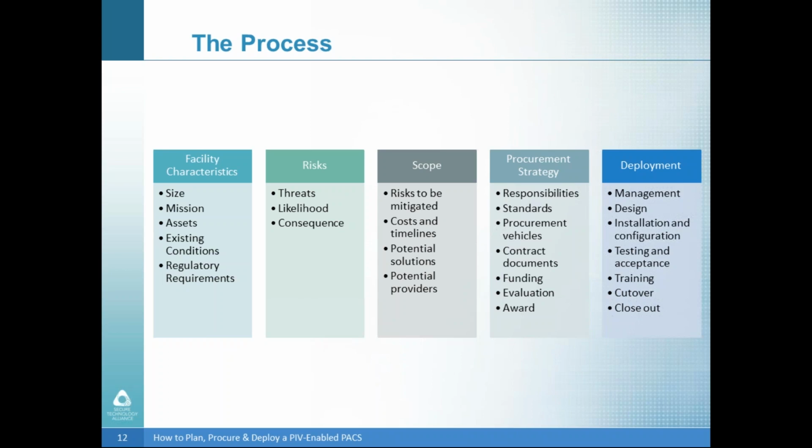Once we have the baseline, we look at the risks of the facility and, more importantly, how well those risks are currently mitigated. Since risk is the product of consequence and likelihood, it's important to understand that access control is only one mitigation tool. It generally mitigates risk by reducing the likelihood. In some cases, specific risks may be more efficiently or more effectively reduced by reducing the consequence instead, for example, by eliminating reliance on a single asset or resource. Looking at the big picture ensures we're spending resources allocated for access control where they're really needed.